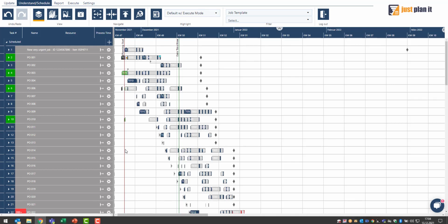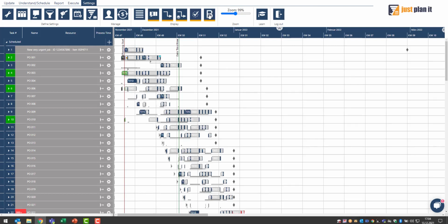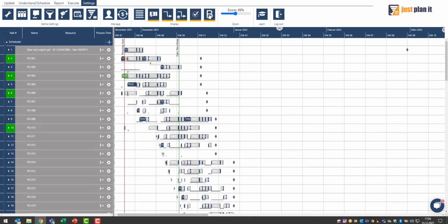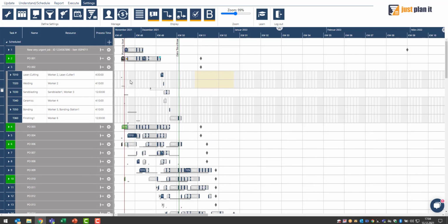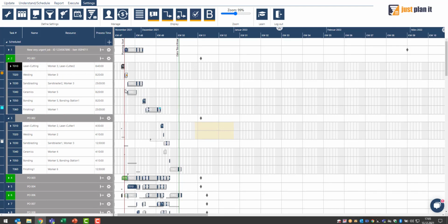And this has changed now, because what we also provide now is this B icon here. And if you press the B icon, what happens then is that in the job view, you will get the possibility also to visualize the baseline. The baseline is visualized by bars that come along like these underscores here.